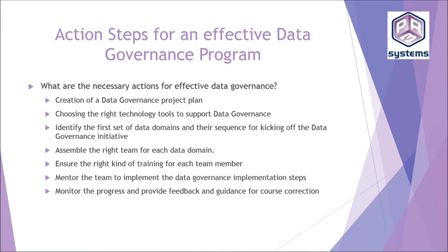Then you identify the first set of data domains and understand the sequence for kicking off the data governance initiative. So you really need to understand what we are going to do. You can't boil the ocean. You have to find a small domain which can really impact the business. You make that domain successful for data governance, and you can scale from there.